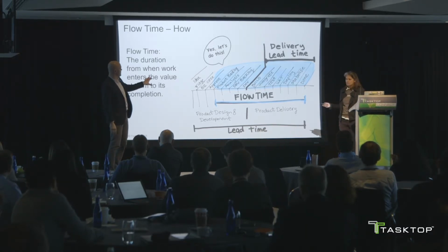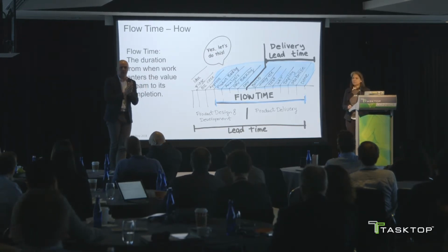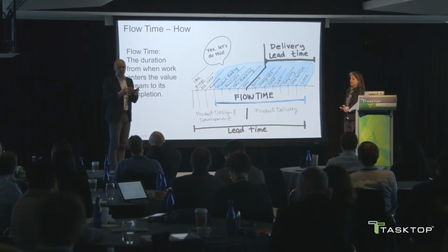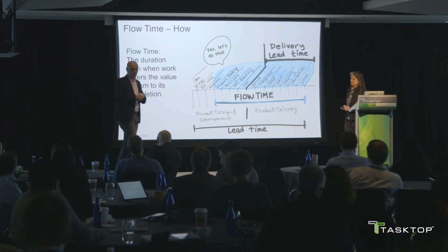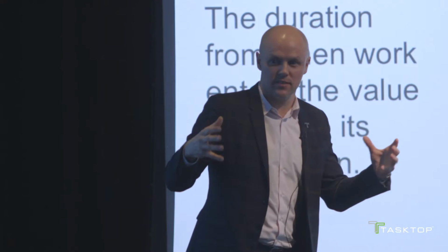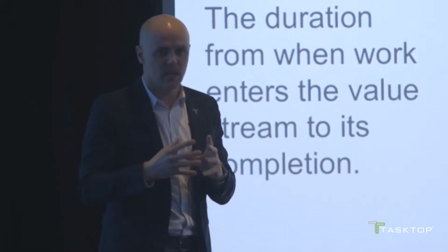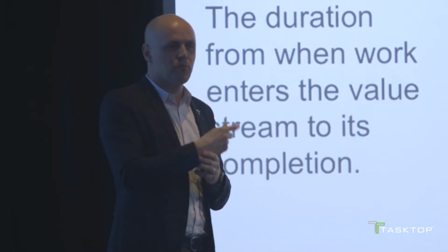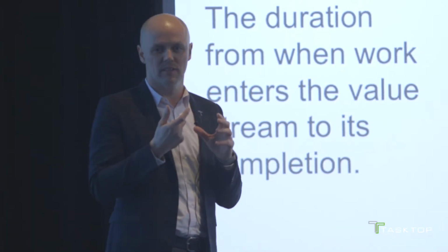And so, stay here still, Dominica. I want to restate a story I heard from Nationwide at the DevOps Enterprise Summit. Kevin Fisher illustrated this very well, illustrating the dangers of thinking of cycle time as flow time or as lead time. So when we were on this journey with Nationwide of measuring end-to-end lead time and learned some of these things that Dominica talked about in their book, we discovered through this process that for Nationwide, as Kevin told it, 2.5% of the time spent delivering something was in development, right?